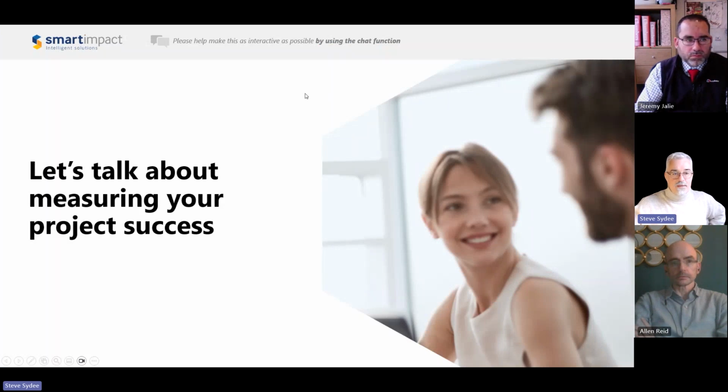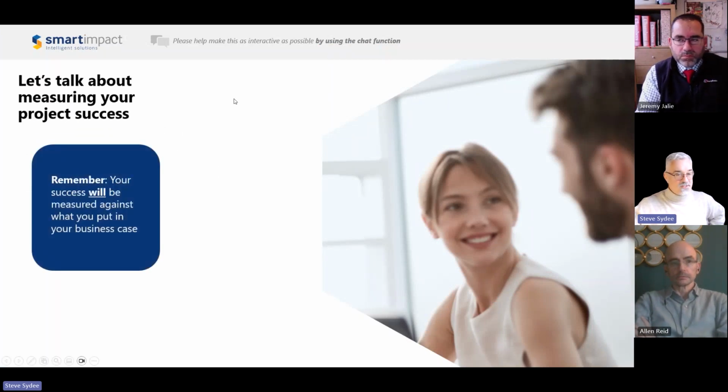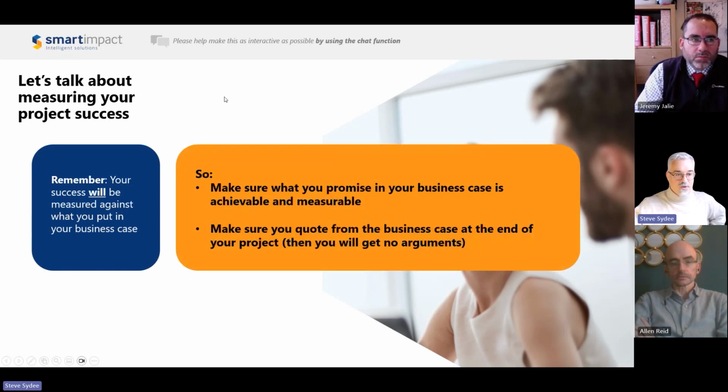So very quickly, let's talk about some project success. First, as Alan mentioned, and as Jeremy mentioned, business case is important. So create a good one, but what you put in it, funnily enough, you're going to have to live up to. So don't put things in that you think are unachievable or targets that are too high. And when you're reporting on the project success, always quote back from the business case.